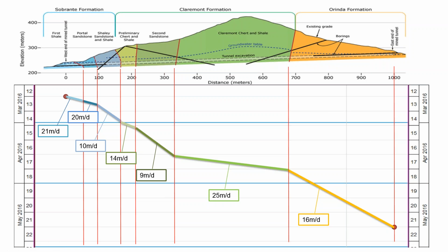And this is very important from the point of view of the tender phase. We also understand and estimate the expected soil type during our tunnel excavation. This way, we can properly estimate our cost and tender price. We can also estimate the best time for starting tunnel work, because we do not want delay.